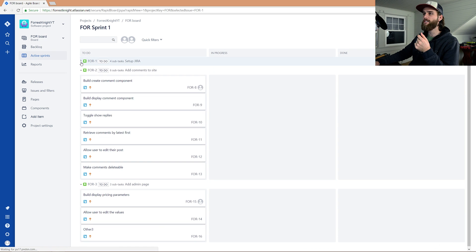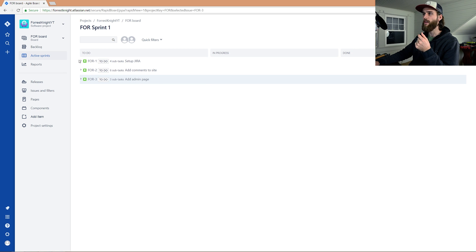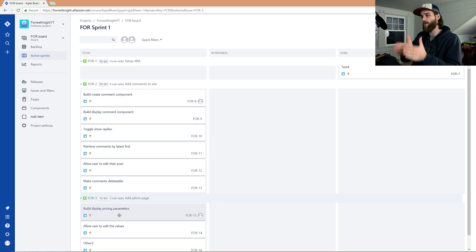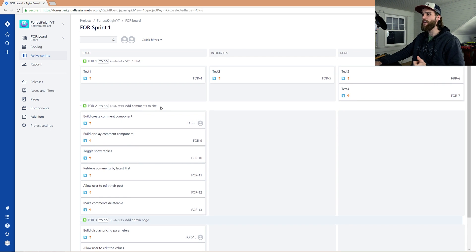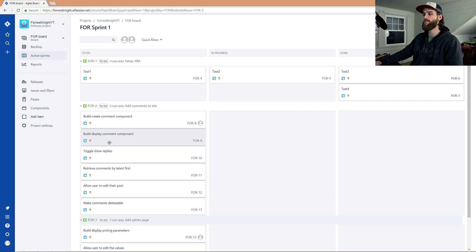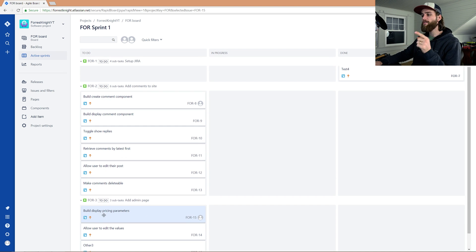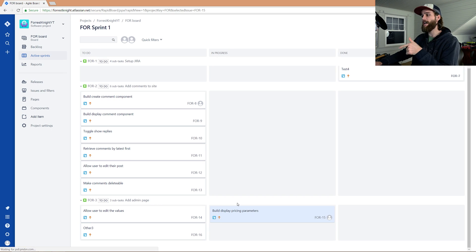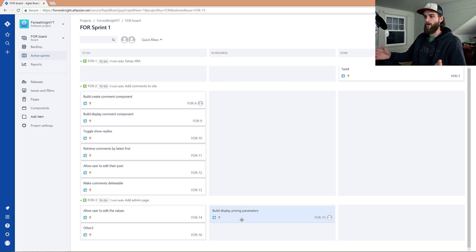This is our active sprint, and as you can see we have three stories here. Within each story there are subtasks, and these subtasks are what you're going to be working on initially. Instead of taking on the entire 'add comments to site,' you would take on 'create comment component' — just a comment form — or you display the comments being stored on the back end. So instead of taking it all on at once, you break it down into subtasks. What we're going to be working on today is 'build display pricing parameters,' so we're going to pull that over from the to-do section into in-progress, and make sure it's assigned to us so your team knows this task is being worked on and people aren't working on duplicate tasks.